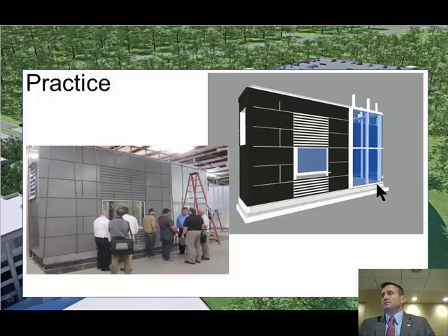Couldn't make it happen. There was just no good way to transition the glass over and down a curb and keep your waterproofing intact. And so that process allowed us then to eliminate the two different details and just drop to one curb everywhere. And it was pretty easy to make the change. But we found that out then.